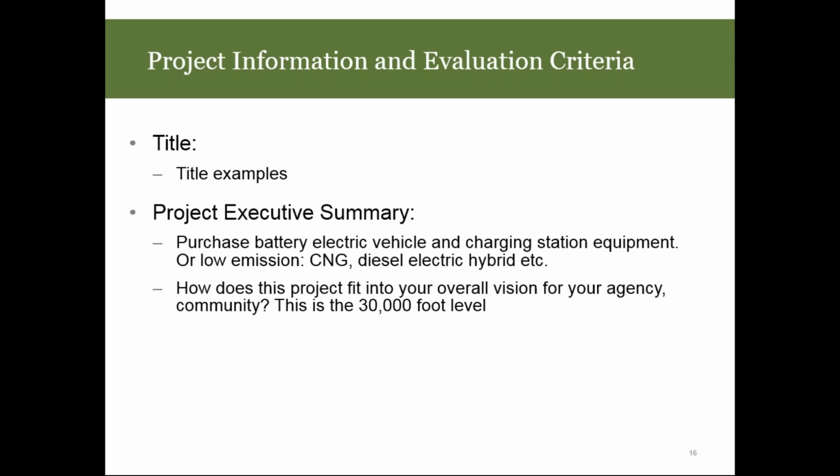So that's something people should keep in mind: what's your contingency plan when you're given only half of what you've been asking for, and how would you adjust to that? We were able to still get the 6 buses, but we leased the batteries in a different form, and that saved us, and we were able to implement the full project that we asked for.